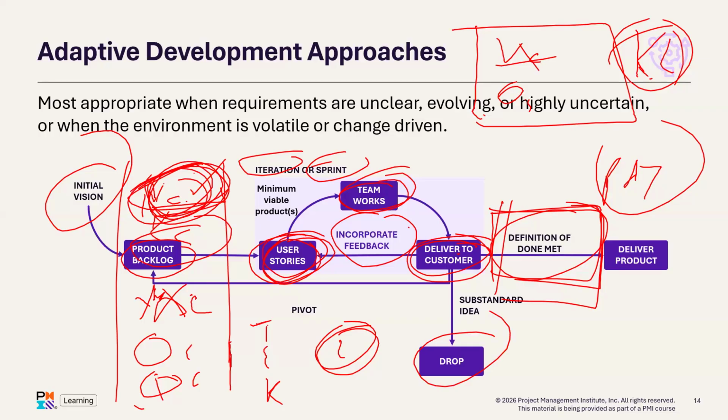Now, after dropping it, it means that we have to go and look for a new product or food supplement that will give us the nutritional value of vitamin C. So the customer will then come and reprioritize this, introduce a new feature, and maybe call it AC into this backlog. Because the original VC didn't give us the nutritional value we expected from this product, so we've dropped it. So we will have to reprioritize, introduce a new feature, remove this feature, and that's what we call backlog reprioritization.